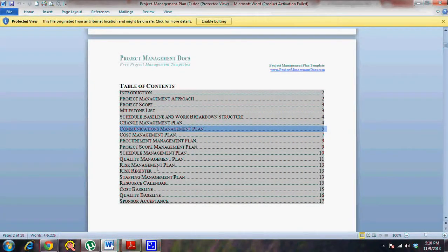You can find the issue log, risk register, and the milestone list also as some of the entries in the PM plan, but PMBOK doesn't treat these as important entries within the project management plan. In other words, you tailor your PM plan based on your requirement. So somebody might hold the milestone list as a project document, while somebody would make it part of the PM plan itself.